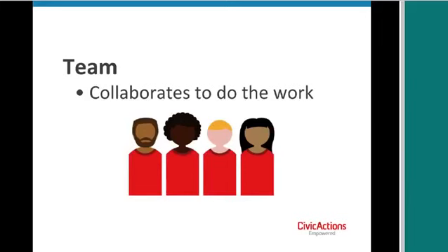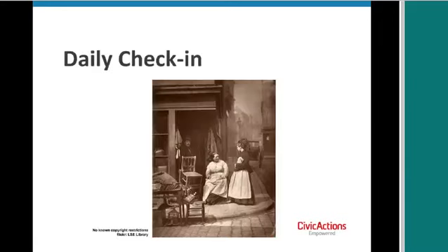While the work is happening, there's a daily check-in. The daily check-in is limited to 15 minutes. Sometimes it's called a daily stand-up, the idea being don't sit down and get comfortable. We're just focusing on checking in here. And each member of the team answers 3 questions. They say, this is what I completed, or what did you complete yesterday? What do you plan to complete today? And what is standing in your way?